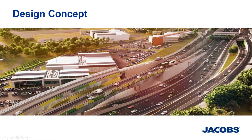The final design concept, now a reality, shows bridge number two installed first, followed by bridge number three adjacent to it. Bridge number two had to come first — it takes Main South Road and diverts it to local traffic. Then bridge number three takes vehicles down the main expressway, eliminating all at-grade conflicts.